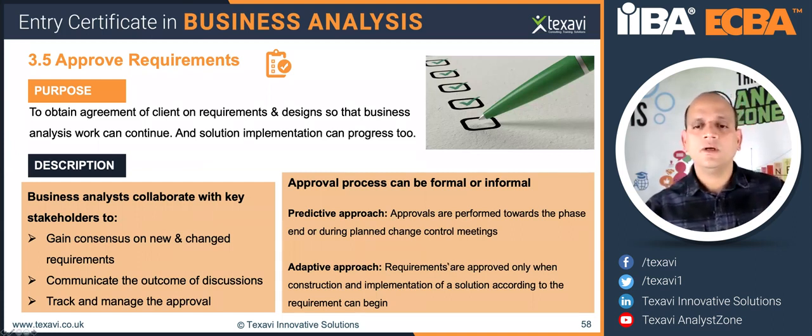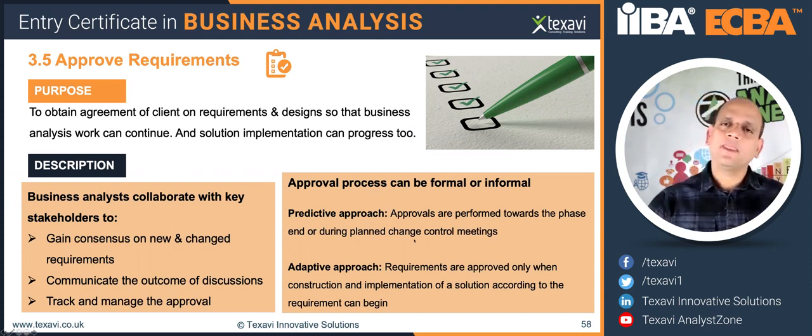That's why, in the context of a project or a process or a product which has a lot of potential changes happening in that industry or domain, it's better to go with agile and adaptive approaches, because you cannot predict what could come next year. So you just go in the flow, and if you've got changes being thrown at you, just grab them, catch them, and then study the changes, analyze them, assess them, and then accept or reject the change and move on.